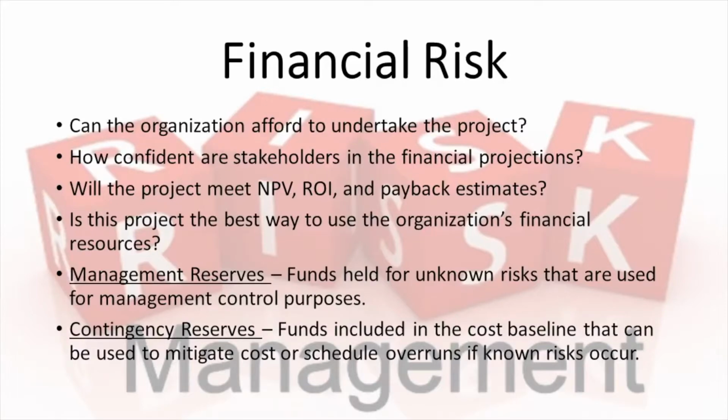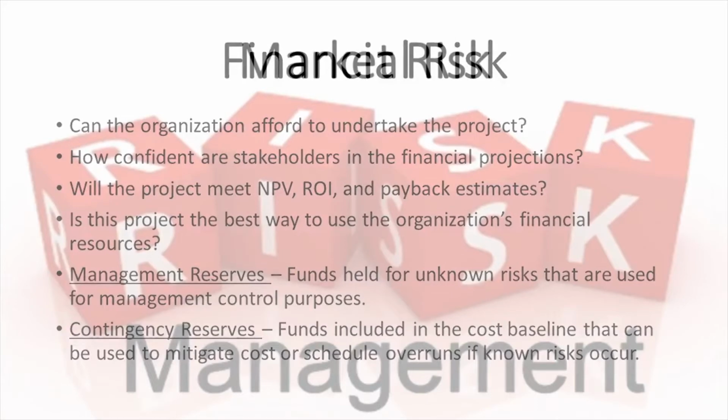For management reserves, that's basically the funds held for unknown risks that are used for management control purposes. For contingency reserves, they are the funds included in the cost baseline that can be used to mitigate cost or schedule overruns if known risks occur.